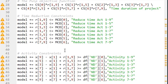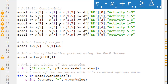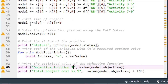After that, we go to the activity constraints, which follow the general format and should be greater than or equal to the normal duration of each respective activity. The last constraint is the total time of the project, which is the difference between the last node and the first node, and this difference should be less than or equal to the number of days we are told to crash the project. We are then in a good position to solve our model using the GLPK solver.